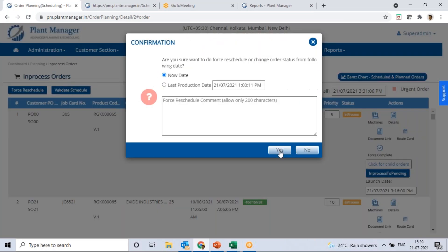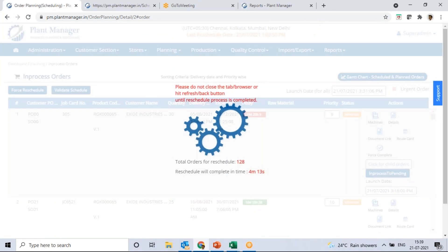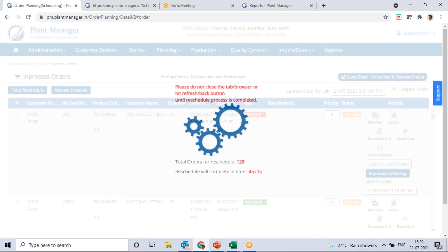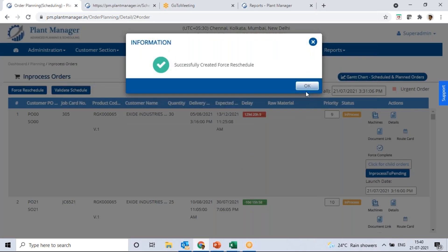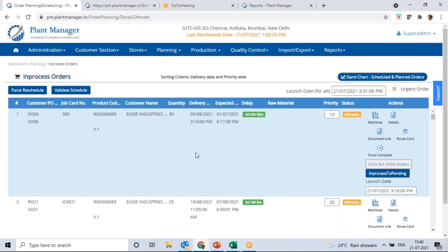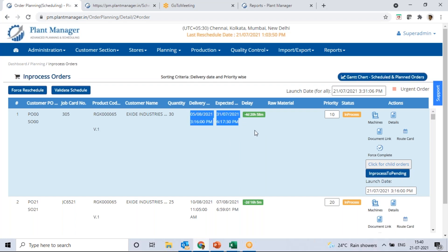Once we confirm the schedule, I'll do the force reschedule — it executes and applies those changes to all orders, taking two to four minutes. Now you can see the result: the delivery date which was 13th December has changed — it will now be finished by 31st July, four days earlier than the 5th August committed date. This is the power of the software and the impact of that priority change.